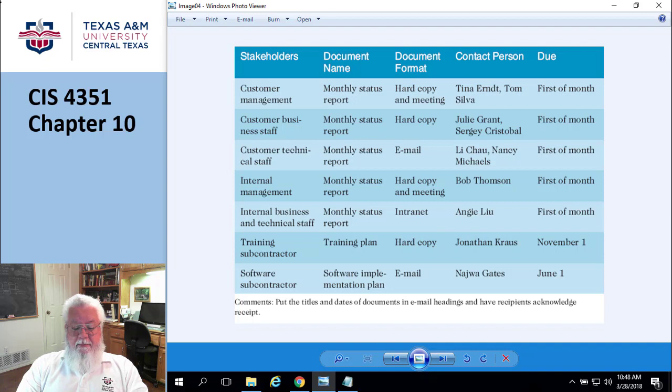So, selecting methods and media. On page 401, they talk about 3 broad classifications of how to do this. The interactive. Interactive is where other people have an opportunity to provide input. It's not a one-way street. So this is any one of the face-to-face types we talked about, being on the phone or video teleconferencing, those kinds of things.